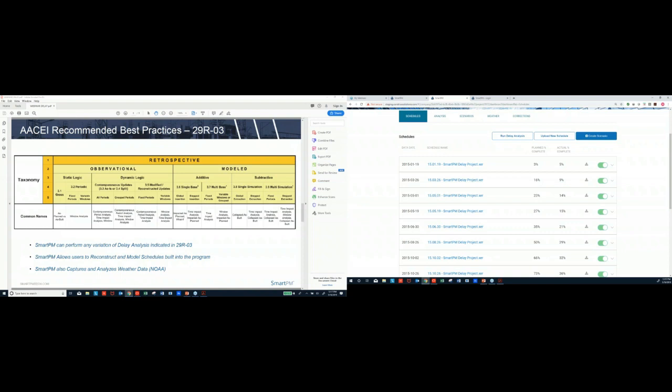And then once you start to find problems in those schedule files, for instance, there's missing logic, there's too many activities with like 90 days of duration that continue to hijack the critical path, things like that, you need to then run a modified reconstructed version. And this is really where consulting dollars go through the roof because you're having to manually go into schedule files and make changes, and it literally will double your cost for a consultant because you have to actually manually make decisions. And actually, when you start making those decisions, it's very hard to bring them back to light when trying to negotiate. And the whole reason most of us do delay analysis these days is to argue who caused the problem.